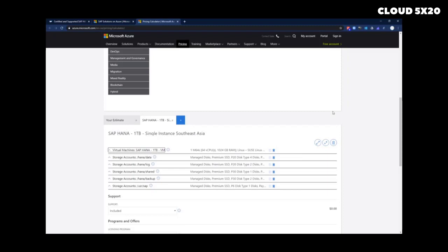When you're doing SAP migration, you have to buy that hardware upfront, right? And you might have to spend more, because when you do iterations, you can't sell the hardware back again, right? So what happens in a project plan is that you have sandbox environment, but sandbox is not just the case, because you have 2 migration options. One is called vertical migration and horizontal migration. So what it means is that people will start doing migration for development first, and then they will start the QA and finally the production, right?